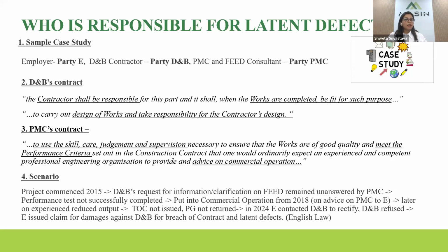The PMC contract, which is the PMC and the FEED consultant, his obligation is to use skill, care, judgment, and supervision to ensure that the works are of good quality and meet the performance criteria. That's the first one. The second one pertains to providing advice on the commercial operation of the plant to the employer within his expertise and experience. These are the obligations of the two parties.